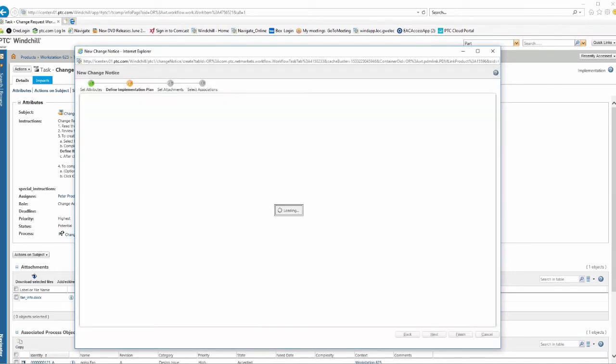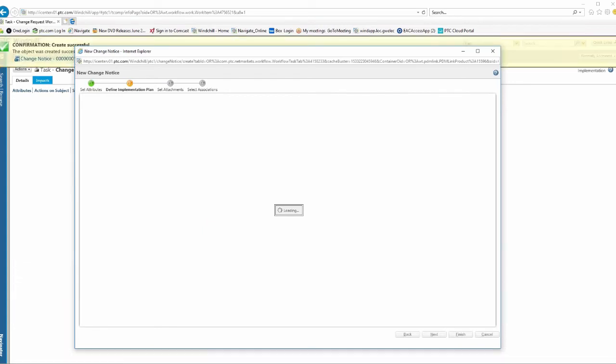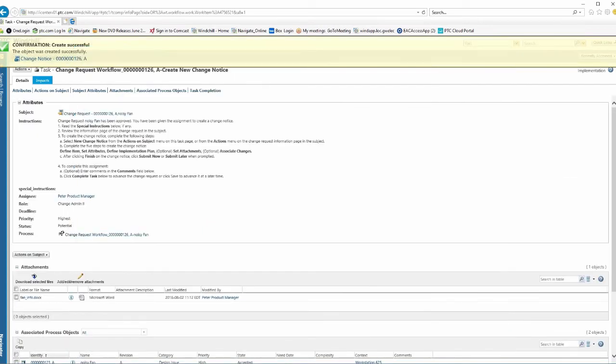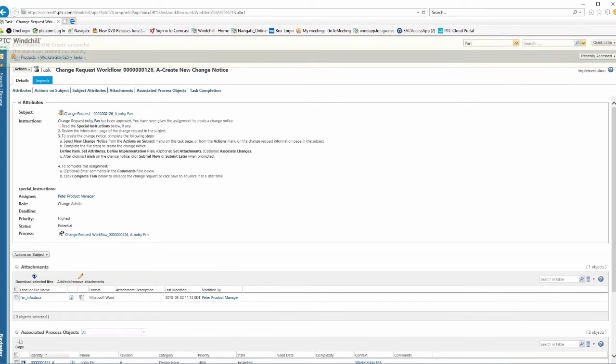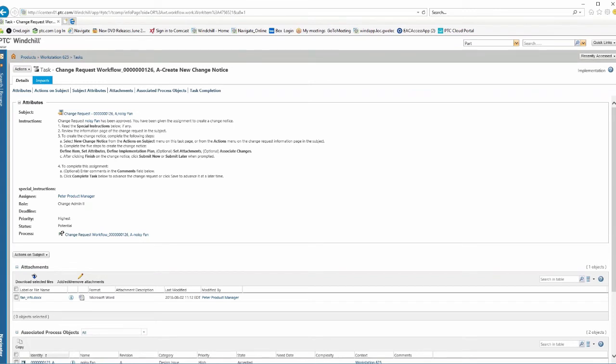So he's the engineer. He's the CAD guy. He'll get in his inbox or his task, take a look at this change request, call up the model, make the changes that I've requested, and then close out that task. And then someone will review it. And then it will be done. So that's kind of the process that we go through.